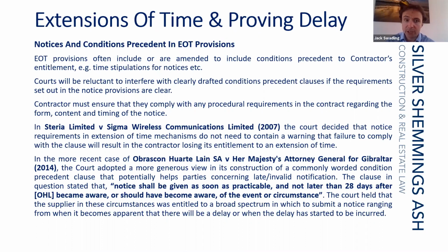Now, it's not unusual to see what look like quite onerous condition precedent clauses which claim to prevent the contractor having any entitlement to claim any extension of time if notice is not put in within a very, very short amount of time of them becoming reasonably aware, or of an instruction by an employer or a contractor.